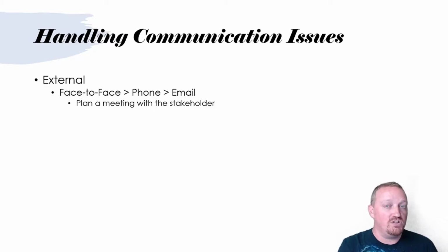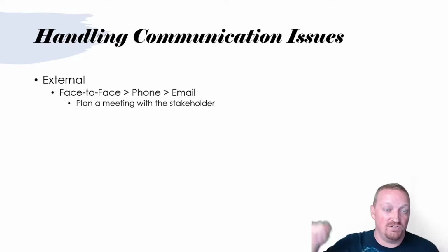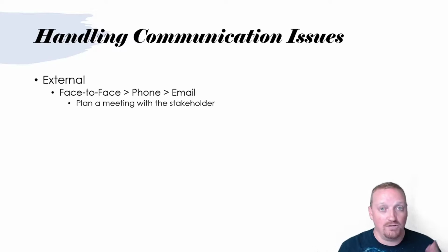Could you put the spike in this iteration and move the story with still communication issues to the next iteration? Yeah, you could definitely do that, and just make sure you get the spike done before you actually try working on the story.